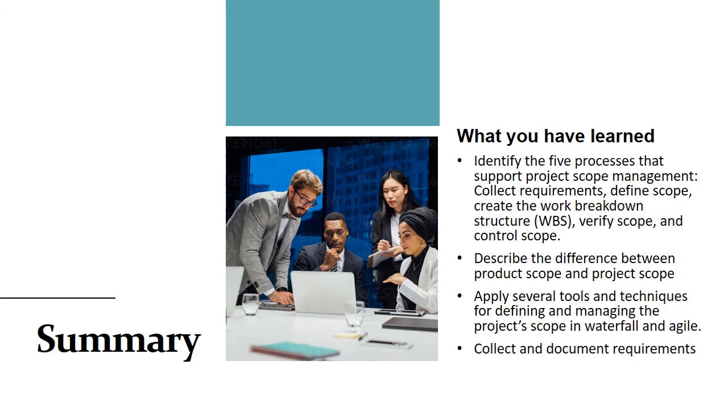Of course, you'll want to be aware that product scope can change along the way, while project scope remains more or less stable. If your product scope changes, these changes have to be documented. In a waterfall environment, you use a change request process to make these changes happen. And in an Agile environment, changes can happen from sprint to sprint depending on the product owner's priorities.